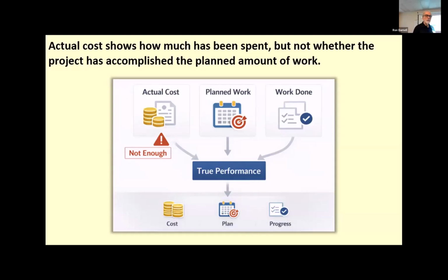One of the key things about earned value also, and we made this point in the prior course, is that it needs to be planned for. A lot of projects don't really plan for it. And then they go and they want to apply it to their project. And what happens is it's not consistent. You don't have a structured approach to it, and you don't know whether what you're measuring is right, and a lot of problems. So the planning part of this is just as important. It's probably more important than the actual carrying it out. Because if you don't have it planned well, or at least set up well, you should do that. And a lot of project managers that I've worked with, they don't really think about it.